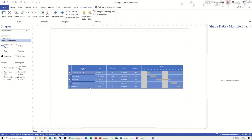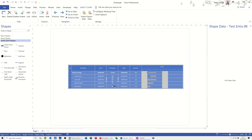You can also indent tasks to create hierarchy. Click on each sub-task carefully with the Shift key, then on the ribbon in the Gantt Chart section you've got 'Indent'. Click that and it creates the indent, making the top one the overarching task for those below. You can see the completion there — if I change some of these completions to 100%, it automatically picks that up in the parent task. Quite useful like that, but still suited for lower-level overview work.